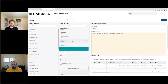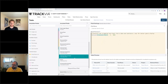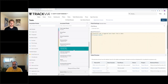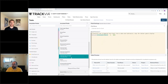There's also a 'calendar start for Gantt' field because the Gantt chart conceives of days as points rather than ranges. If this task ends on the 13th and the next starts on the 13th, there will be a gap on the Gantt. To fix this, I subtract one day from the regular start date for the Gantt version — so instead of starting at the beginning of the day, it starts at the end of the night before, making items touch each other seamlessly.